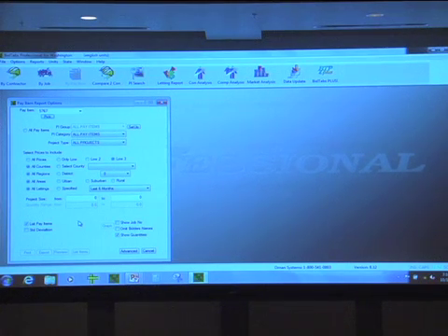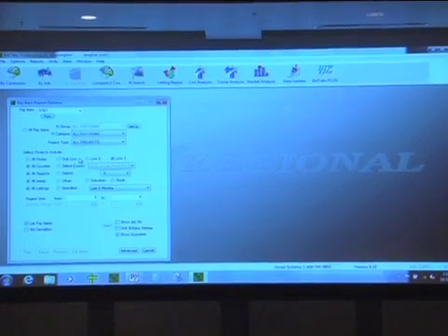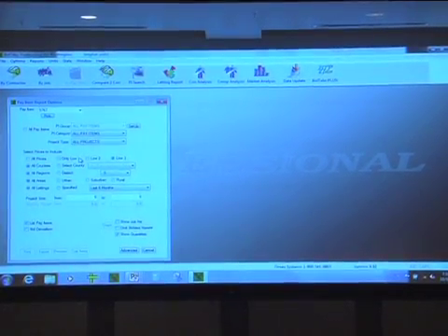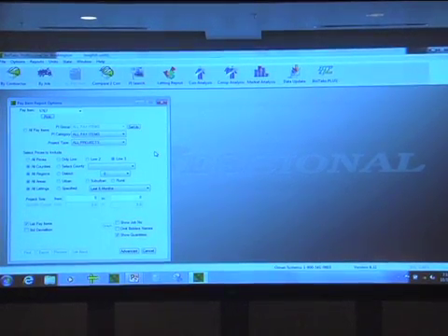Next, I've got to decide, okay, what kind of bid prices do I want to look at? Here I can look at my low bidders, my low two. I don't normally look at those to determine a price unless I just need a price really quick, a good idea of what it's kind of costing. I usually go out to low three, then I can get a range. It's somewhere in between here probably, unless I see the bid prices are going all over the place.